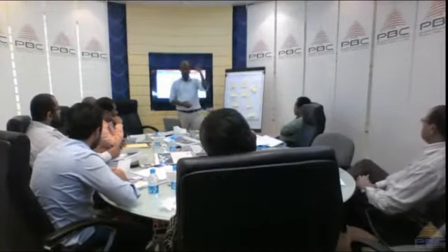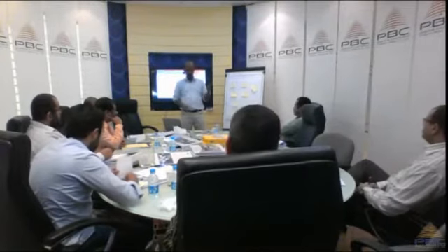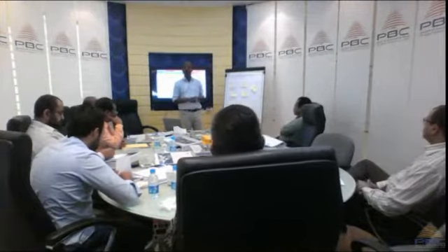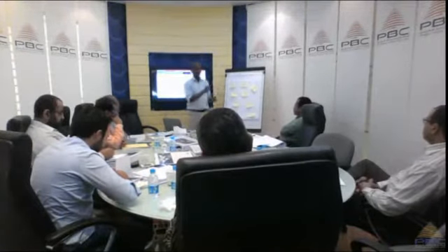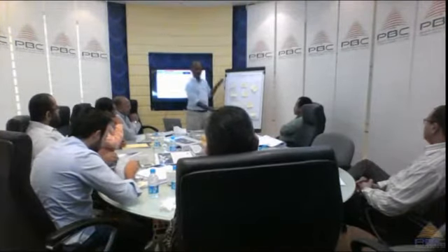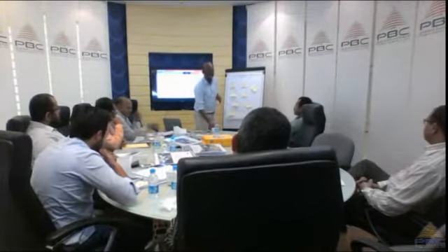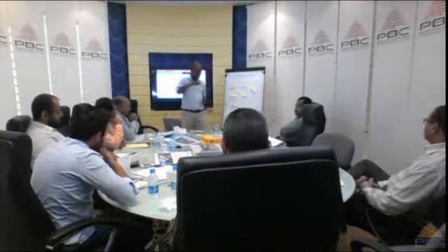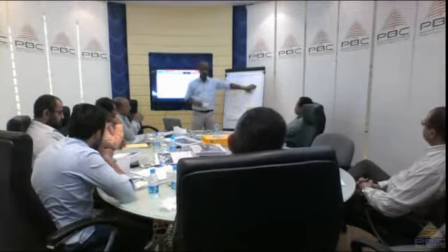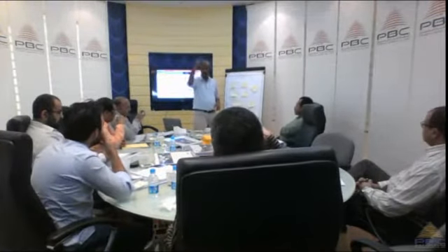What about the negative strategies? Negative risk strategies: avoidance, mitigation, and the third one, transference, like insurance. And the 7th one, common to both negative and positive, is called risk. We said there's a strategy which applies for both. When we do nothing, we call it what? Risk acceptance. Okay? Right. What is the risk threshold?